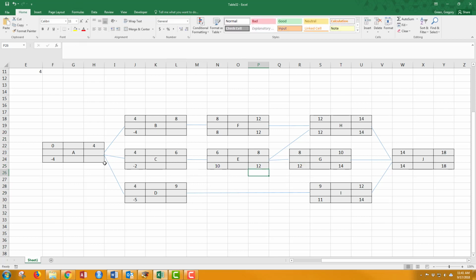And the rest of it, with the exception of node A, should be relatively simple. There's just single edges going back between these nodes. So equals late start. And finally at A, I have three edges feeding back into A. Once again, I'm going to use the minimum. I'm going to use the minimum of the late start times from B, C, and D.